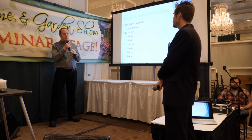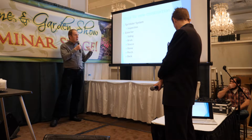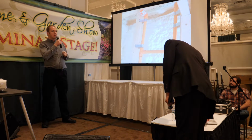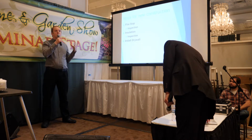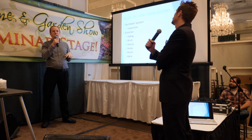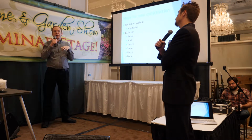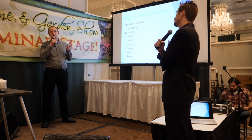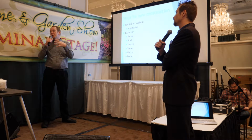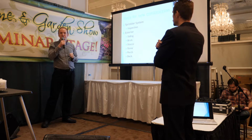Once you've got everything installed, go ahead and do your siding, your brick, your stucco, your stone, and then do the porch or deck that you may want to be putting into the house. So some people do it a little different. Some will wait until the drywall's up. Some will wait, or do it right away. We recommend to do it right away because now you have a house that's a lot more watertight. Even though a house is wrapped, once you close it up, once you've got the drywall and insulation in there, if water gets in back there, you may not see it. Now you've got water kind of just sitting there and potentially causing a mold issue down the road.